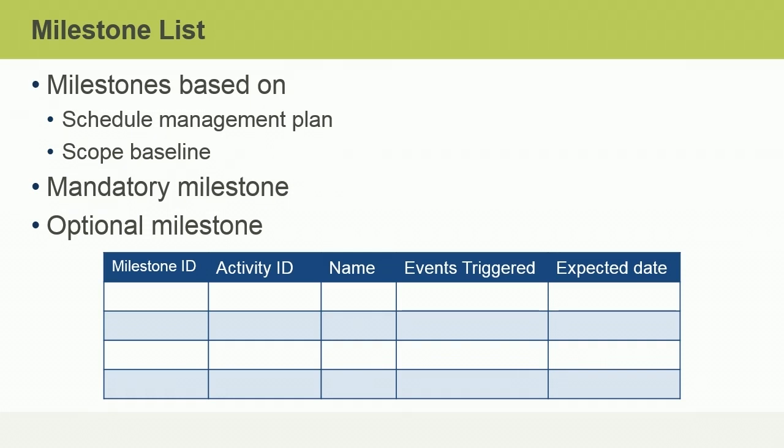For instance, in a project to create a new centralized help desk, a mandatory milestone is the customer requirement that they must approve the floor plan design before any construction can begin. An optional milestone is the point when team members compare project performance to the plan on a monthly basis. This has saved you time and money in past projects, so you would like to see it done in this one, but it's not critical.